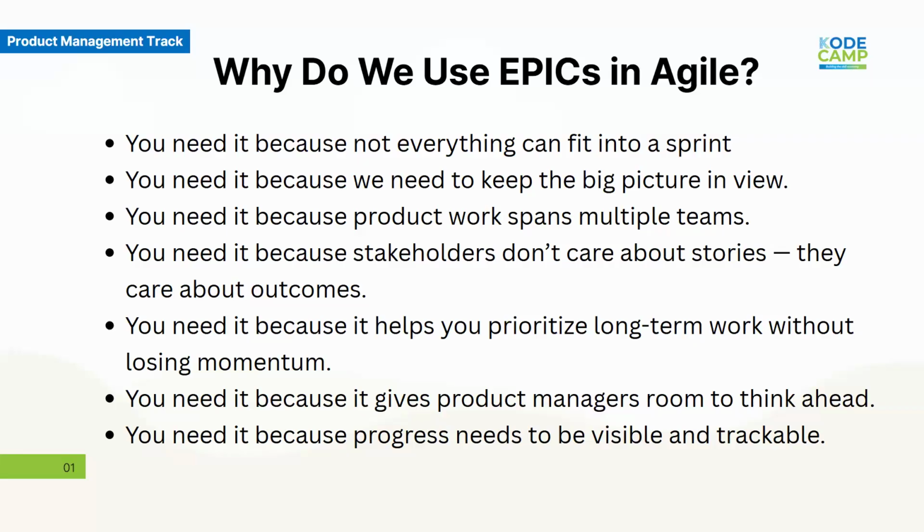When you report progress, you report it at the Epic level. So when you're trying to report your progress so far to your boss, to your CEO, you report it at the Epic level. Now we are 80% through the authentication Epic. That's an example of a report. The search Epic is complete. That's the language the business side understands.